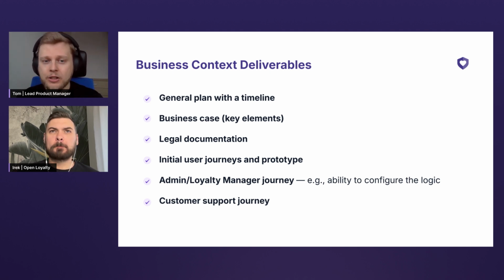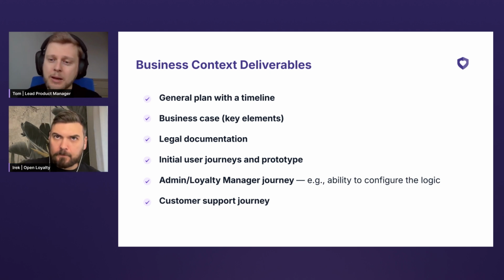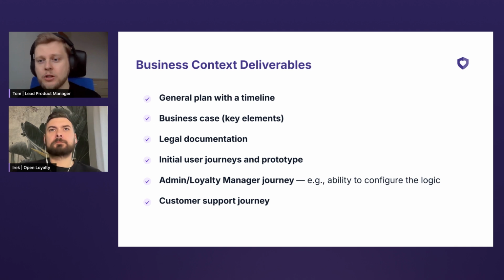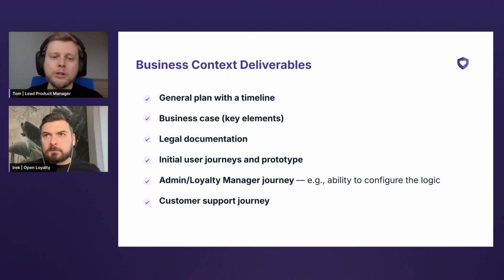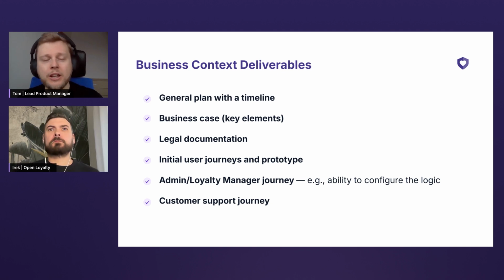Then the business case. The business case will be prepared by a loyalty manager or the business owner. It will contain all the business assumptions, goals, KPIs, and also the financial analysis for the loyalty program, all the elements that are necessary to make sure that you know what value you want to bring to yourself and to your customers. Then it will be legal documentation like terms and conditions. Depending on the industry, there might be different things that you need to figure out there.